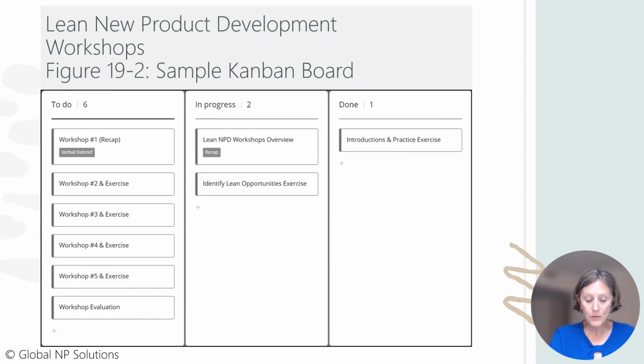Affinity diagrams, Kanban boards, and burn down charts are used throughout the full life cycle of a lean new product development project. Depending on the scale and scope of the new product development effort, the team may use only a single Scrum board with these elements to manage the project. In other situations, sub-teams and incremental activities will repeat the tools to manage more detailed work. Remember that the program manager also tracks project constraints for the chief engineer alongside these working tools.